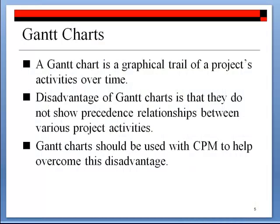A Gantt chart is a graphical portrayal of a project's activities over time. There are many different variations of Gantt charts, depending on what the project manager is trying to accomplish. We'll construct a basic Gantt chart based on the previous CPM example. A Gantt chart is typically used to monitor the progress of various activities — helping project managers know which activities are behind schedule, in progress, completed, or about to begin. One disadvantage is that Gantt charts do not show the precedence relationships between activities, so they should be used with CPM to overcome this.